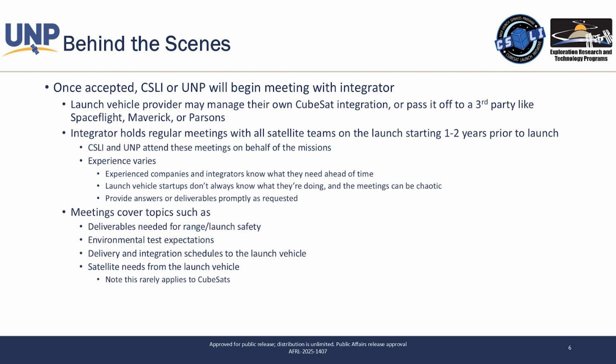And in CSLI, we make sure that we hold regular meetings with all of our satellite teams on a two-week basis, right? This is to make sure that we're all moving ahead and that all the information is being shared. CSLI and UNP will attend those meetings on behalf of you as well. We're there to step in if they're talking and guide you with technical assistance, technical know-how.